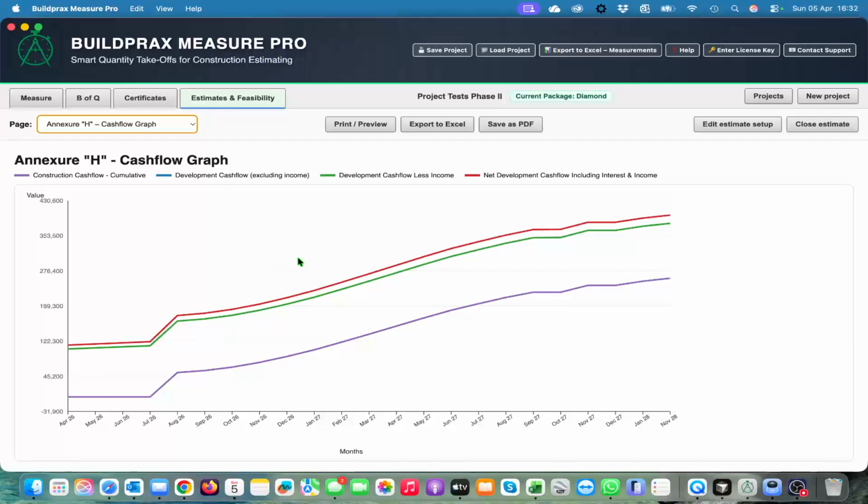And if it goes up, then you know that your real costs go higher than this, then you know you are fine, you're above program. Or if it goes below that, then we know we have to do something about the program, and we must try and get as close as possible to our forecasted cash flow.